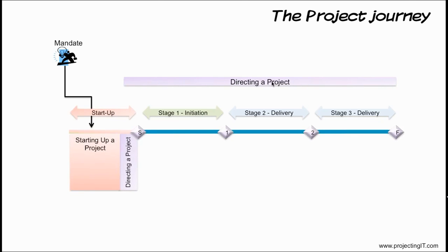The project manager goes to the project board and submits the project brief. The project board will check why this project is required, what needs to be done, at what cost, and the time scales. The project board will check if we have necessary funding arrangements in place and whether the project is viable and if the benefits are enough.